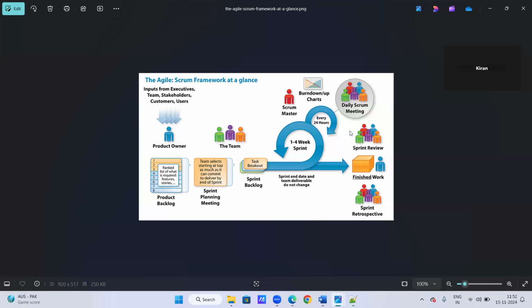So we will have a piece of software which contains some working functionalities, and after finishing the work, we will have a sprint review. The sprint review is nothing but checking what stories we have completed and what is still pending, and whether there are any bugs, and whether all bugs are closed or not. These things are reviewed internally in the sprint review, and that is not the sprint retrospective. Okay. So the sprint retrospective and the sprint review are both different.